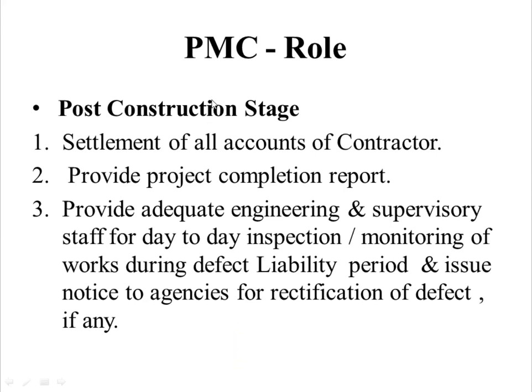Now, the last stage, that is the post-construction stage, the role of PMC is the settlement of all accounts of the contractor, provide project completion report, and the third role is to provide adequate engineering and supervisory staff for day-to-day inspection or monitoring of works during the defect liability period, and issue notice to agencies for rectification of defects, if any. So this is the role of PMC during the post-construction period.